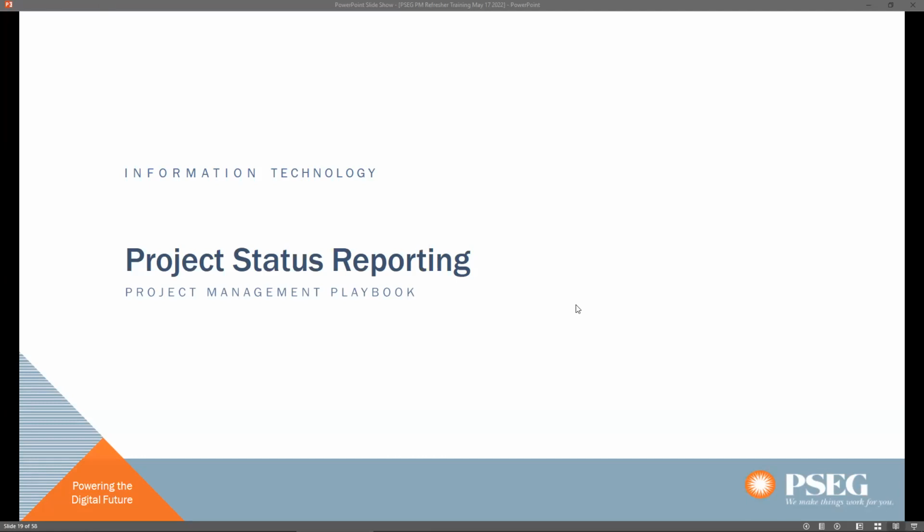Before I start the project status reporting module, I want to highlight a few things about project status reporting and the project health review. They are important artifacts from the project manager's perspective. Each month PMs enter information into the status report. That report is extracted and analyzed by IT PMO and shared with GSHAN and SLT members in the monthly PHR meeting, which generally happens on the third Thursday of every month.